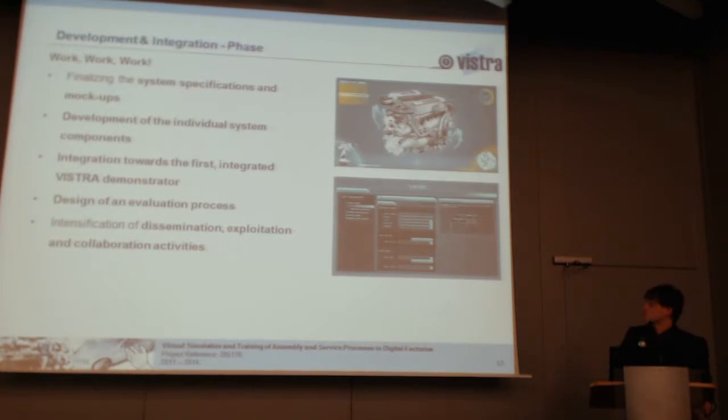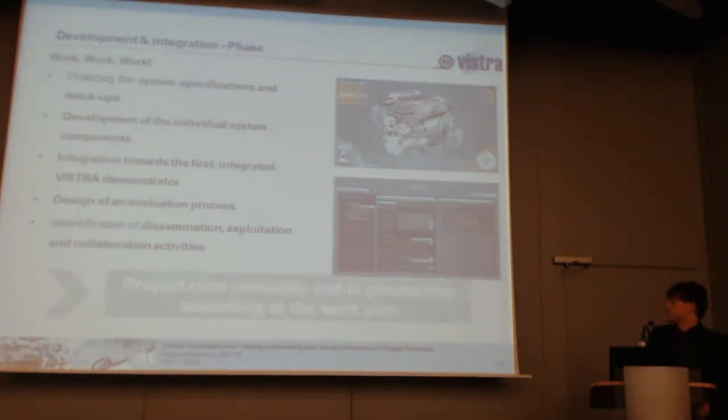After meet, you will come in the phases which we could call walk, because you have to specify the system, you have to start developing, and really important is integration. If you do not integrate what the single partners develop, then you will not be able to show a feasible solution. You will not be able to bring your project to life. And we spend very much time on integration. That's not always nice for researchers, but I think it's important in order to get to some results.